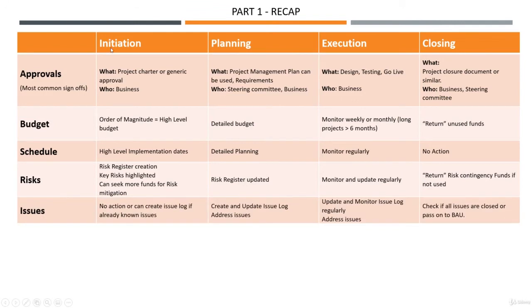Issues. During initiation, unless you're very unlucky, there's no issues. But if there are, create your issue log a little bit earlier. Try to address them as early as possible, or at least plan for them to be addressed. During planning, you definitely create your issue log and you start addressing issues. So the issue resolution exercise is starting there.